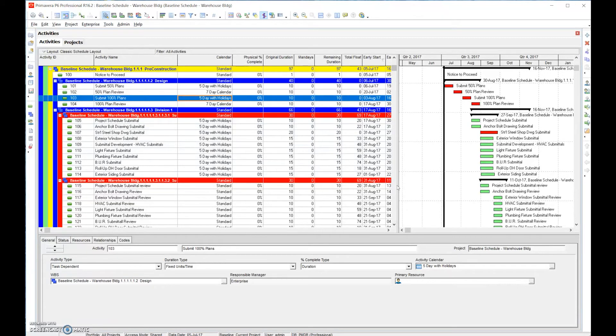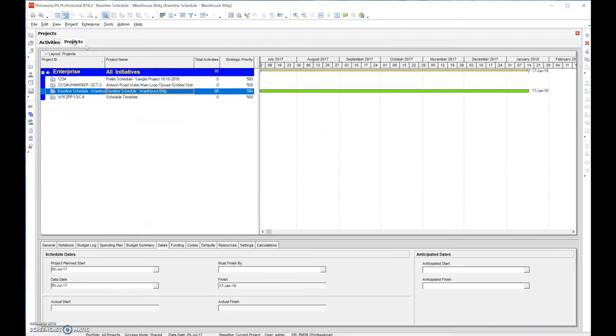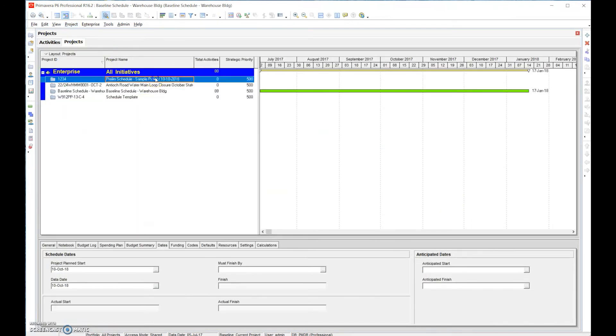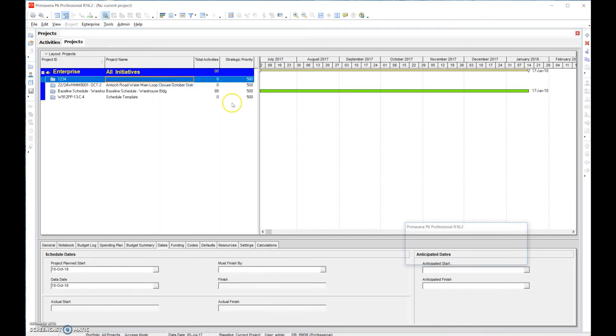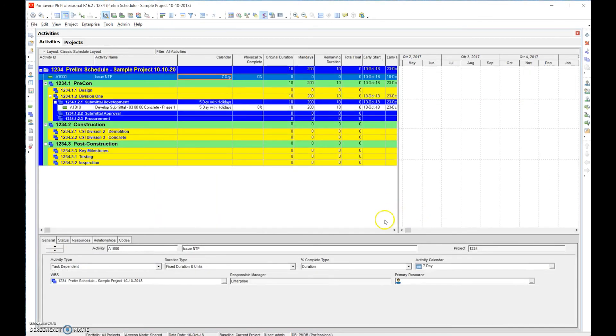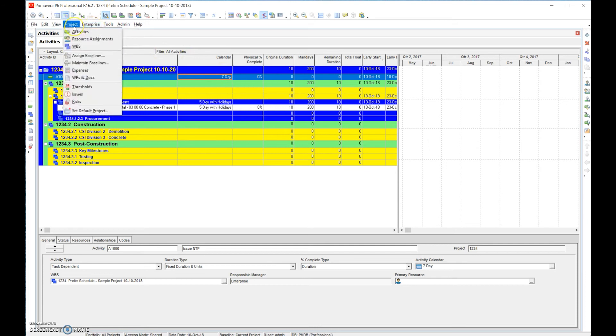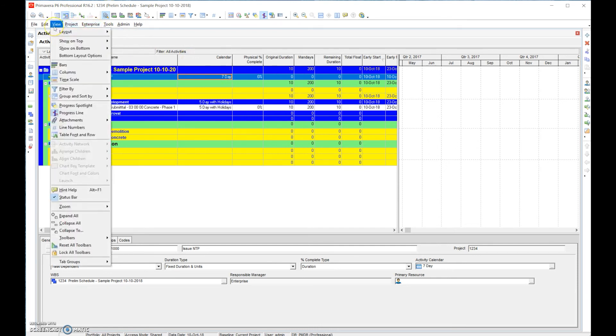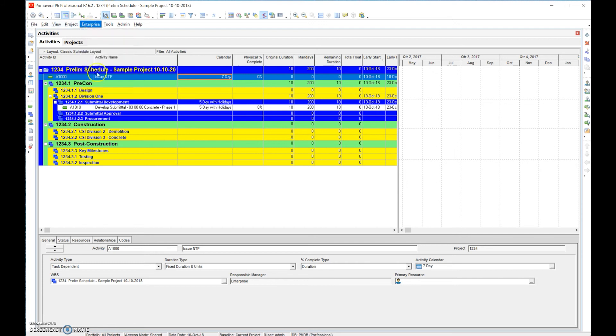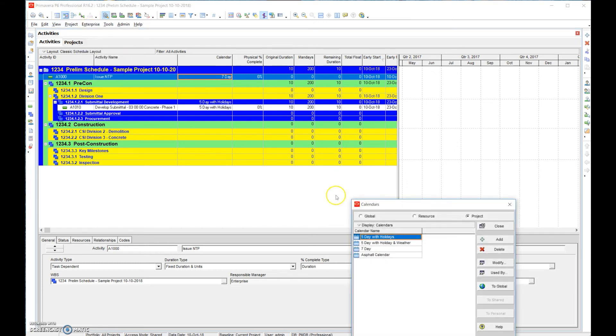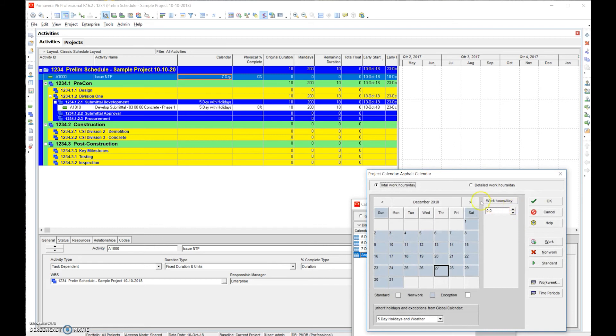I bring up the asphalt calendar because the asphalt calendar is very important. In many places asphalt plants shut down during the winter and we don't want to be saying that we're going to place asphalt during the winter because that really doesn't tell the true story here.